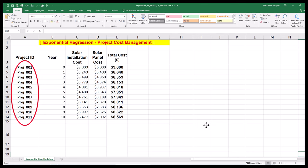Step one is plotting data to find trends of exponential growth or decay. Our case study includes 11 projects of installing solar panels. The installation costs are increasing exponentially due to factors such as inflation and increased labor costs. The panel prices are decreasing exponentially because of improving manufacturing processes.